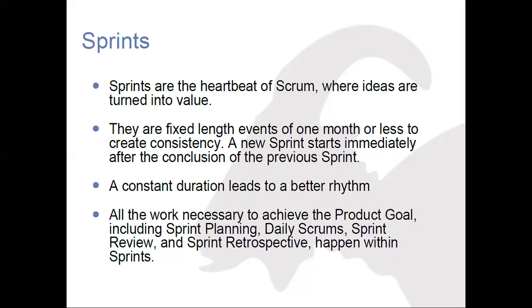And all the necessary work to achieve the product goal, including sprint planning, daily Scrum, sprint review, and retro meeting, happen within the sprint. Every event will fall within the sprint.